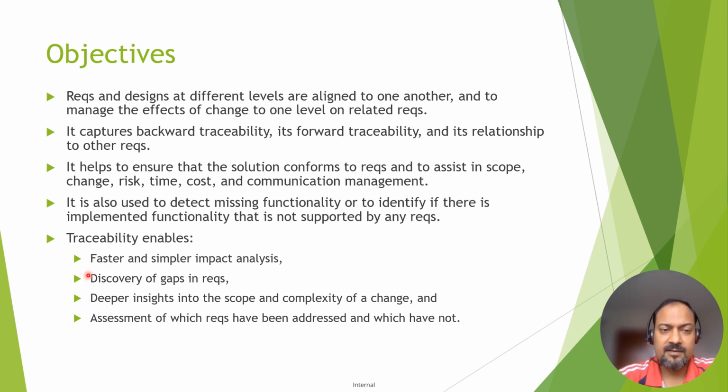Traceability enables faster and simpler impact analysis. When we are saying faster and simpler impact analysis, suppose an RFC, a request for change, comes into the system where the business analyst needs to do the impact analysis. Tracing is a very quick method.